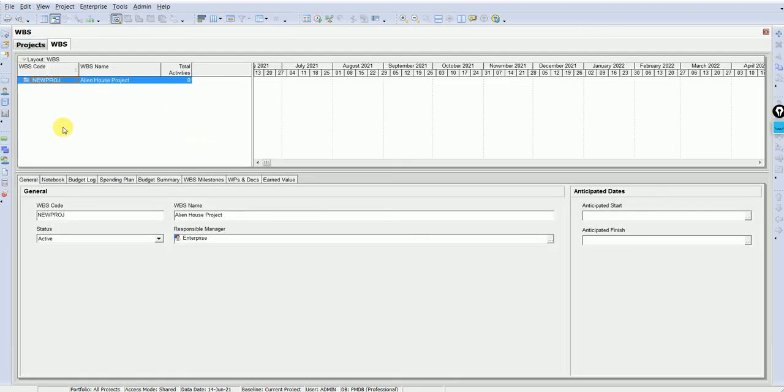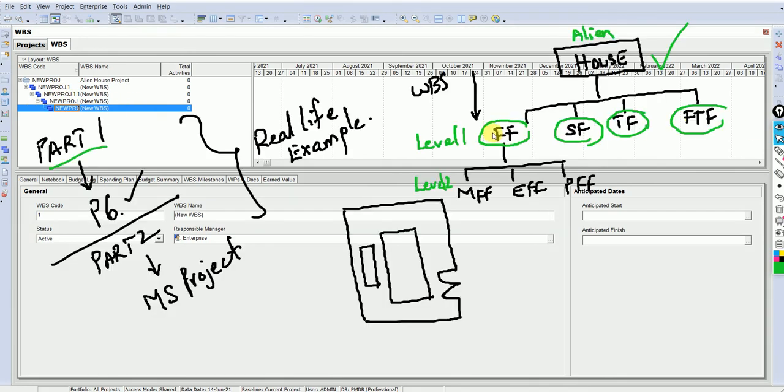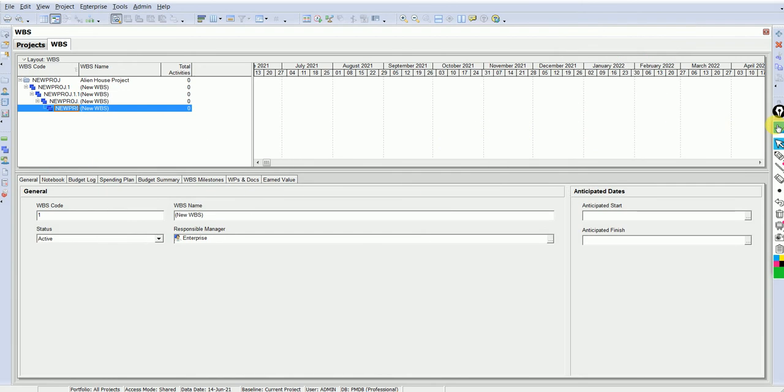Now what do we have to add? Activities. Let's say the level 1 activities. So come here and click this plus sign to add. Okay, 2, 3, 4. Now we will just keep them all towards the left, because they are all in one level of hierarchy: first floor, second floor, third floor and fourth floor. So I will click this, and down here click the left arrow.